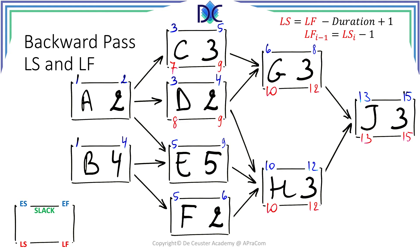And now we can have a look at activities E and F. Again, they are predecessors of D. So their late finish cannot be more than 9. And activity E should not start later than April the 5th. For activity F, like I said, the same late finish date as activity E and the late start date of F is April the 8th.